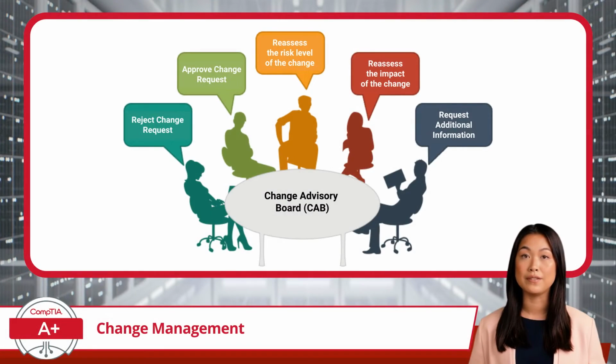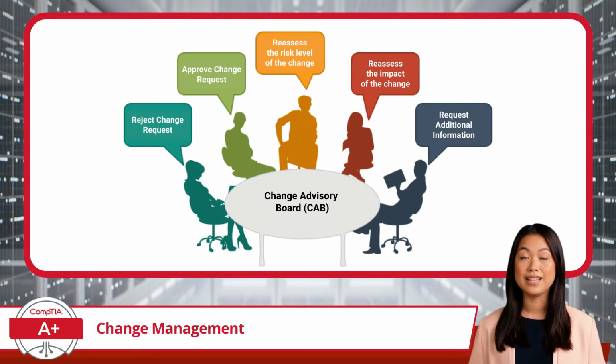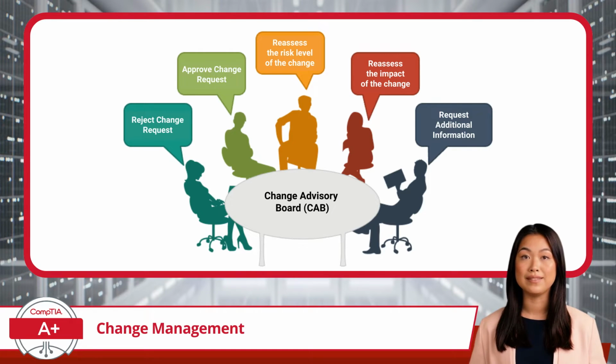Once a change request form is prepared, it enters the critical review stage, where it is assessed by the Change Advisory Board. The Change Advisory Board is a dedicated team of stakeholders and decision-makers who serve as the gatekeepers of the change management process. Their primary responsibility is to ensure that the proposed change aligns with organizational goals, adheres to established policies, and minimizes risks or disruptions. This step is essential for maintaining control over changes and preventing unnecessary or poorly planned changes from being implemented.